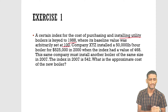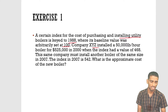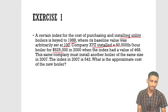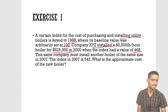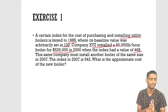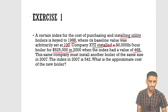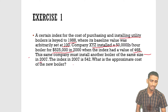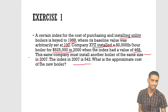Company XYZ installed a 50,000 lv per hour boiler at $525,000 in 2000, when the index had a value of 468. You can clearly see that here we have to apply the cost index model — focus on the values and what the question is demanding.